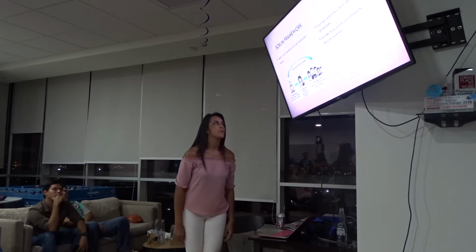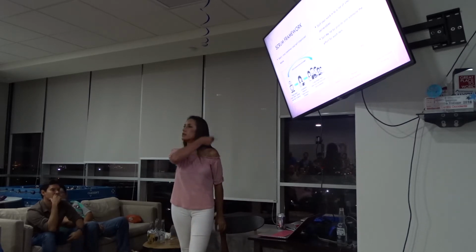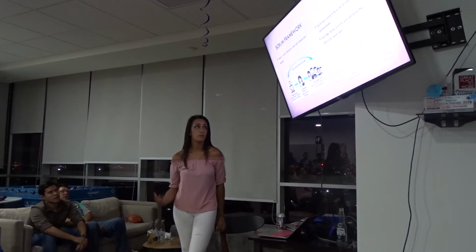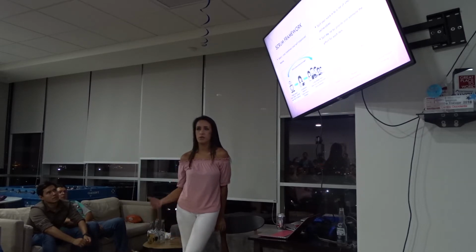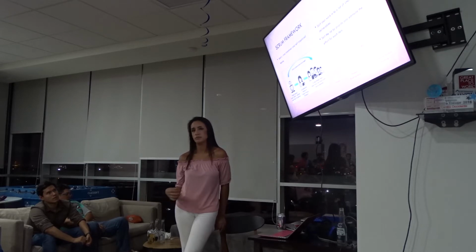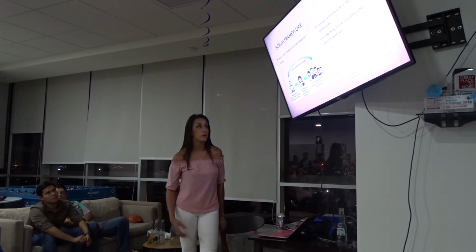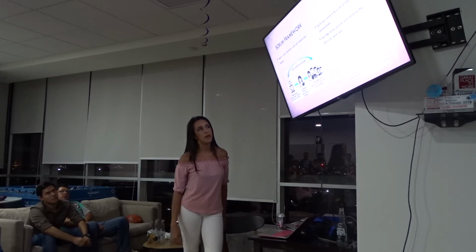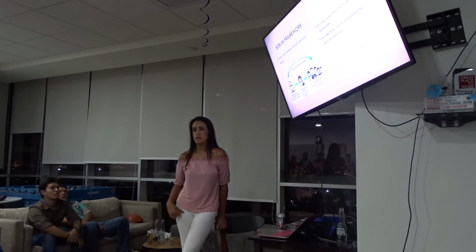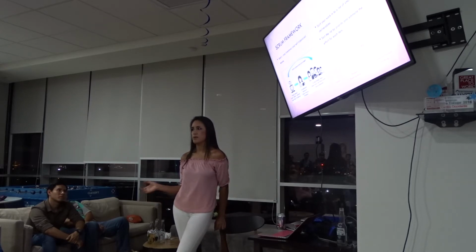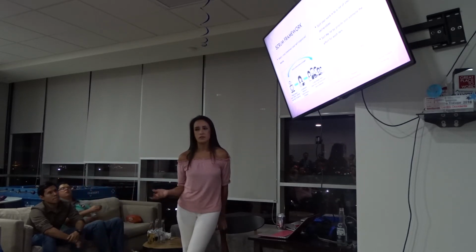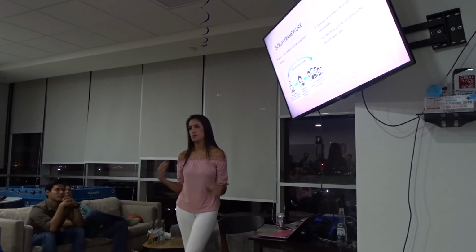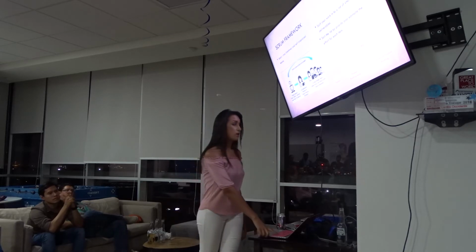The product owner is the one that has the what and the why. He's the one who has all the information regarding what we're going to work on. The Scrum Master is a facilitator who keeps the Scrum going; if there are any blockers within the team, he or she has to find a way to remove them. And we also have the Scrum delivery team, which is the how, how they're going to deliver. The Scrum team is not going to be told how to do it. You're a team, you're self-organized, and you can decide whether to implement it with one tool or another, whichever fits better. You're not going to be told you have to implement it this way or use these tools.